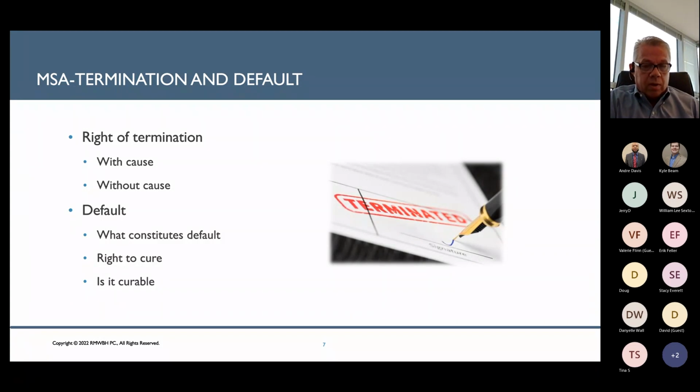We generally recommend that your contracts have a termination with or without cause, preferably 30-day notice, maybe in some cases 60 days. And that way, when things go bad, you don't have to go through this tortured process where it becomes a dispute over whether or not there actually was cause or what exactly the circumstances were. You can just say, you know what, we just think we need to end this. We're going to send you this termination letter. And within 30 or 60 days, this contract's going to be terminated. And there's no back and forth about why or how or what.